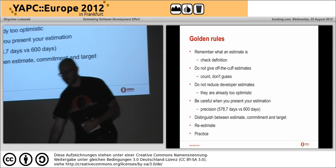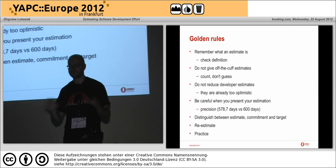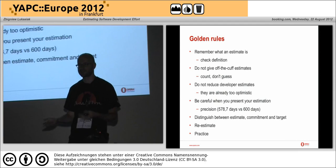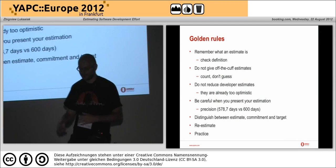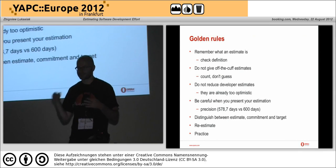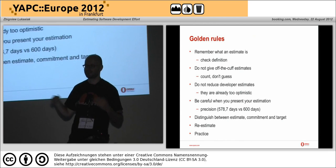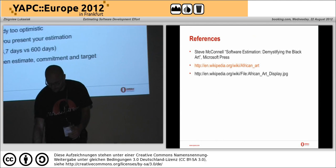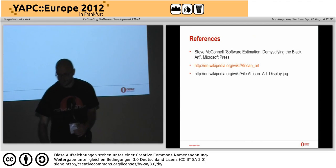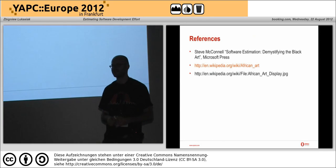The golden rules: check the definition of what you're estimating. Don't give off-the-cuff estimates - if the boss hears an off-the-cuff number, he makes a commitment to the business and you can't change it. Be careful, and re-estimate regularly. Here is the book this talk is based on. Thank you.